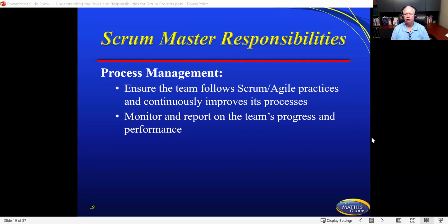You're still learning each other. You're learning what to do, what comes next. And so it's one of those things that you've got a little bit of a learning curve as a team. But after you've run 3 or 4 sprints, you're starting to pick up how many items or user stories or features you're going to be able to deliver to that customer in a 2-week sprint. And now you can start projecting what and how long it's going to take for that project to be finished.